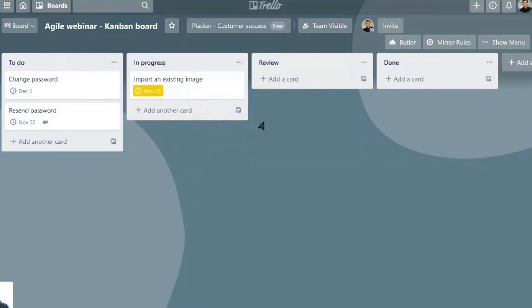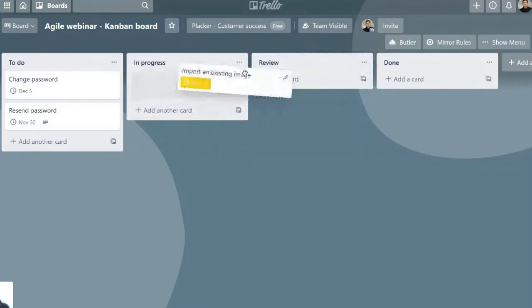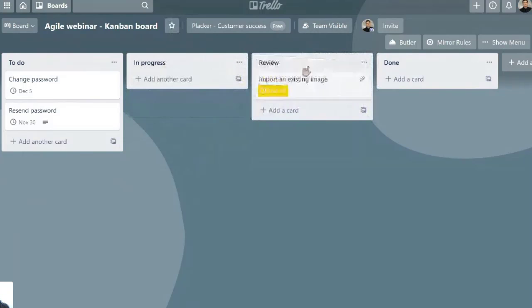if this depends also on obtaining approval from a client, we can have a list called review, and we can move the cards to the review list while our client is reviewing that page.